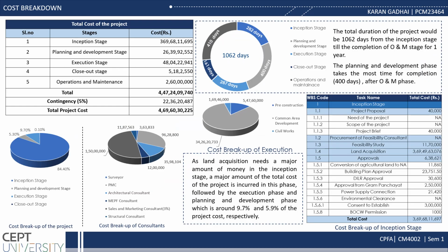A cost breakdown structure is a hierarchical representation of the project's cost. The cost breakdown structure represents the cost of work breakdown structure components. The cost breakdown structure is an essential tool for managing the project's life cycle, particularly the financial aspect of any project, by establishing a framework for implementing measurable cost control. It is a key component for the feasibility study and aids in keeping record of money flow.